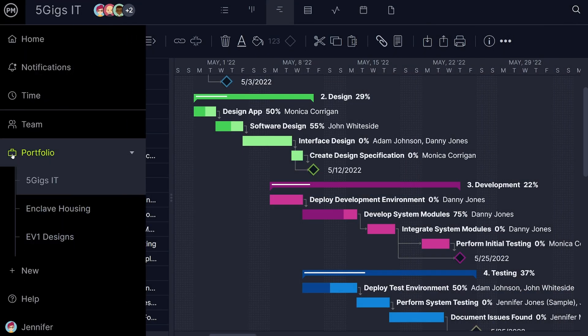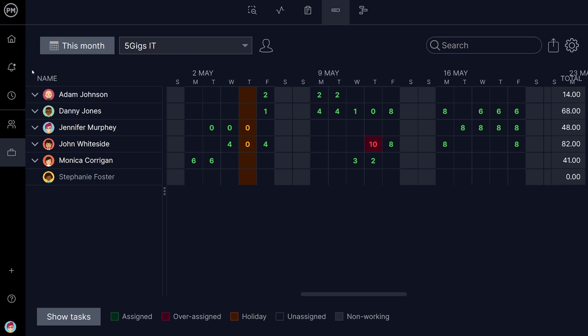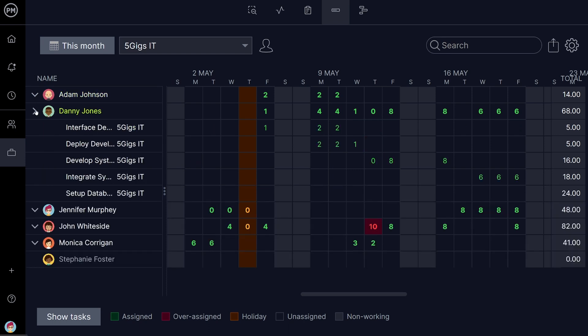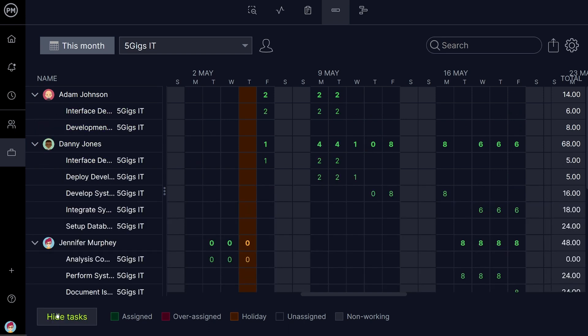Make sure your resources are balanced by visiting the workload page. Your holiday settings will be reflected here as well. This color-coded breakdown of team members' hours lets you quickly see if anyone is over allocated, under allocated, or on holiday. Click the arrow next to team members' names to see a drop-down of their tasks, or click Show and Hide Tasks to show or hide all tasks at once.